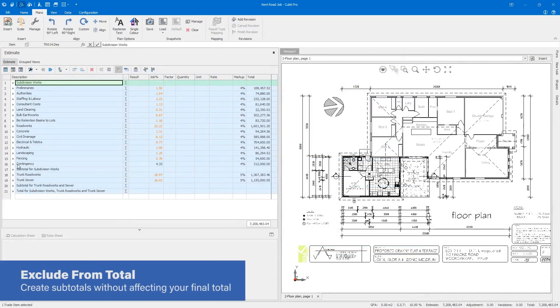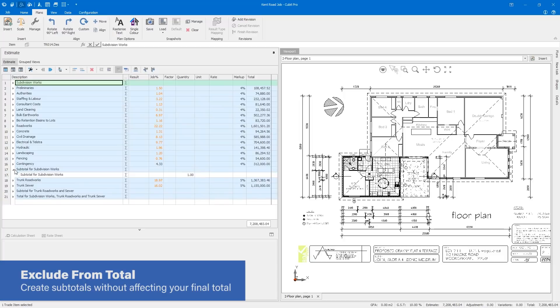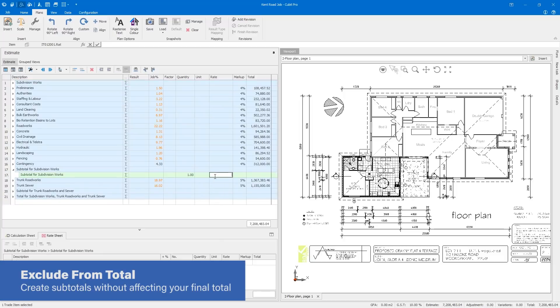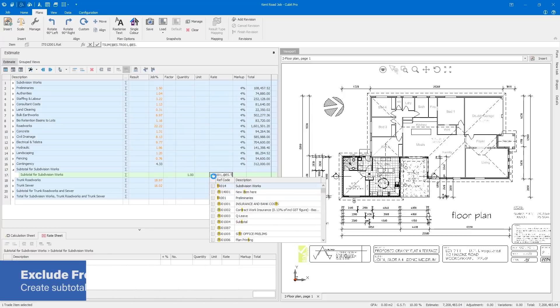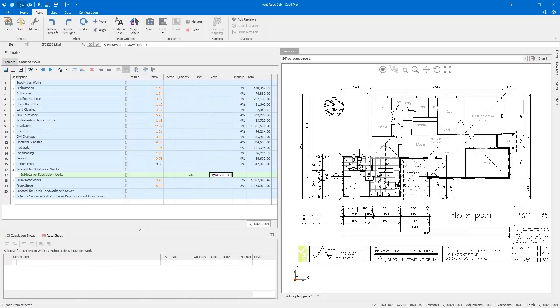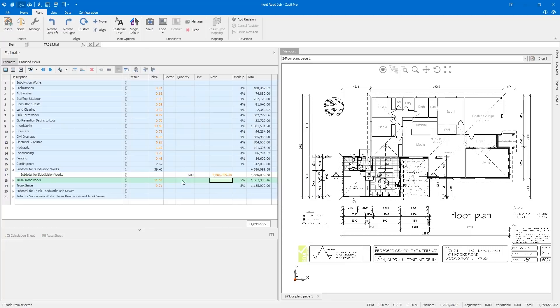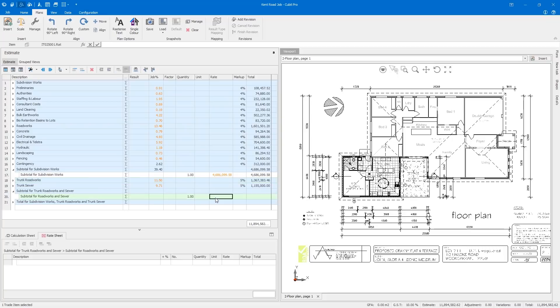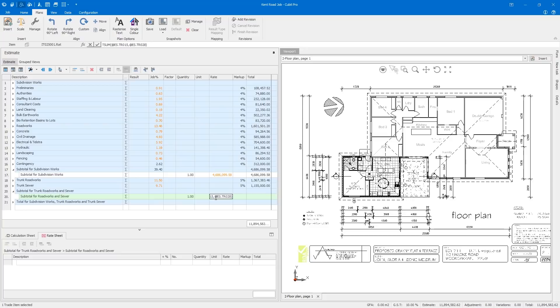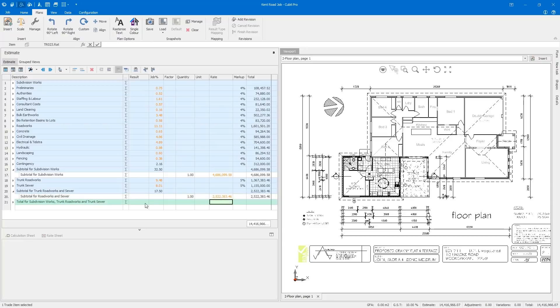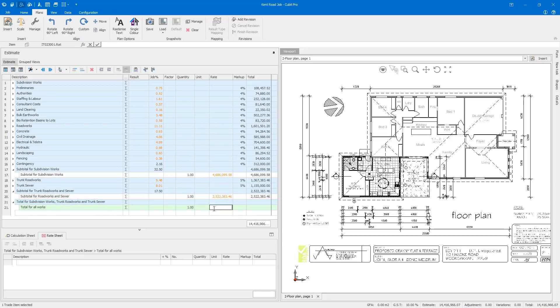Creating additional sets of calculations or subtotals within your estimate is a necessary part of the estimating process and Qubit does it easily. But the challenge has been how to create subtotals without affecting your final total. It's a challenge no more. In Qubit, simply mark the specific items and trades that you want to exclude from the job total.